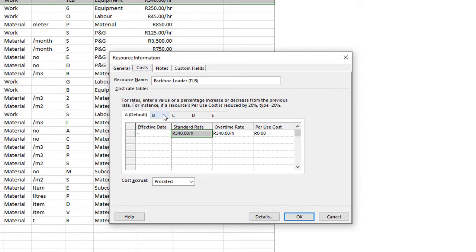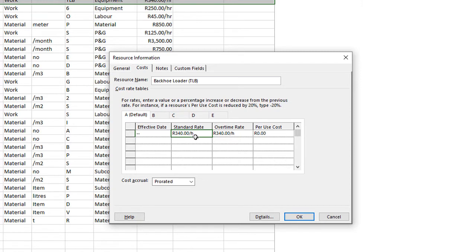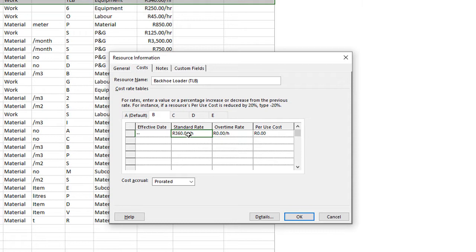So if you click on the B rate there, I've added in at this point a rate with profit. So I just want to do an example for you. So A rate here will be my cost. So this TRB, this piece of equipment is costing me 340 Rand per hour, but I'm going to sell it for 360. So that's the profit on top of that, that's my B rate. Okay.